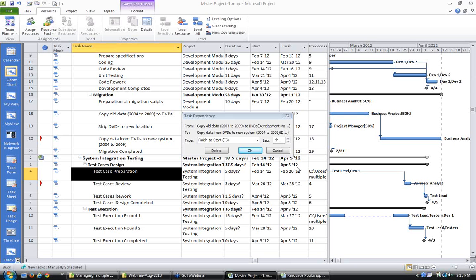So I will always suggest, do not schedule your project plan on an hour basis, even in big projects, not on a day-to-day basis. But you prepare a project plan which will guide your action on the ground, and you need not look at the project plan on a daily basis. Once a week or once a fortnight, depending upon how big your project is, you can update this project plan and see how your project is looking.